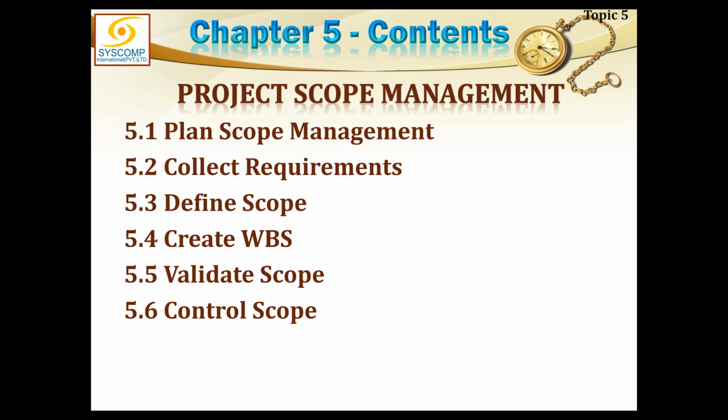Most of your time as a project manager must be spent in planning. You remember there were a maximum number of processes in planning. So it is not wrong to say that 40 to 60% of a project manager's time is spent in planning. Our planning should be given 40 to 60% of the project time. If you do that, everything is almost like an operation, because you have laid down the rules and now you are just going to be walking on those steps. There will be uncertainties, there will be changes, there will be risks, but they will be much, much lower than when you jump into a situation without thinking.